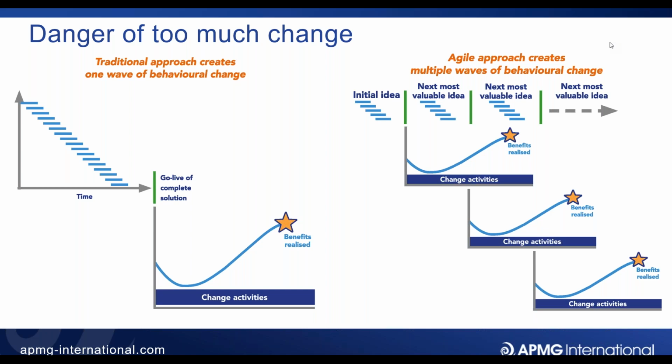Okay, the most important thing I do is I don't try to centrally control it. The most important thing I do is I build a change agent network or change champion network who are on the ground doing the impact assessment with their colleagues and picking up all of the little impacts and managing them themselves. I think that there is a great deal to be lost if you try to overly control impact assessment. I do want to understand what the impact is, but I don't just want to leave it at that. I want us to